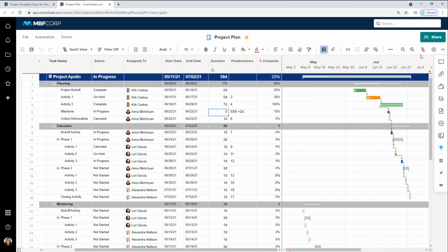And I can enable my critical path by coming up to the top and right next to our project settings button, enabling the critical path. What this does is Smartsheet's actually going to find the latest chronological task, so the last task that we need to accomplish before our project is considered complete, and it'll look at all of these dependencies and work backwards to find the tasks that, if they were late, would make that final task late and would make our entire project late.